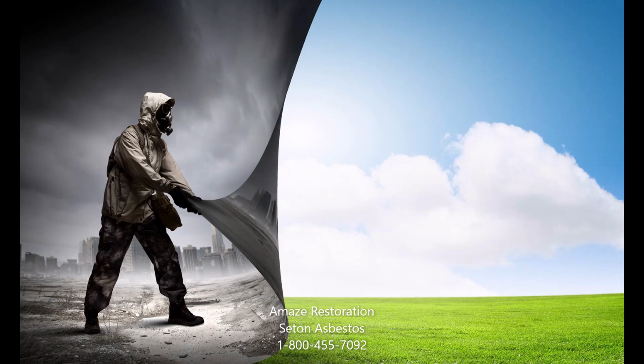Asbestos removal is also known as asbestos abatement or asbestos remediation. After a certified asbestos professional has completed an inspection and testing and the results have returned positive, it's time to begin the asbestos removal process. Your certified asbestos contractor will then set up containments for the areas and materials affected. Only qualified technicians will be allowed to enter the contained areas until the removal is complete. Regular progress updates will be provided throughout the process.